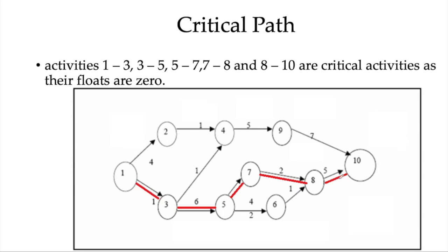So you cannot have any delay on this particular path of the project. Whereas you can have certain delays on other paths and still finish the project by the deadline. And those delays are basically the slacks which are shown here. So for this particular class, we'll stop here.